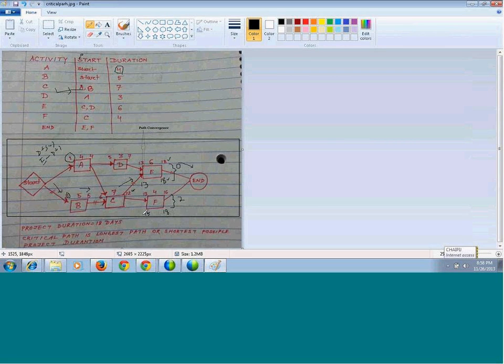Now if it can be started on day 15, then by which date must this be completed? It must be completed on day 12 because this is dependent on activity E. So if we delay this activity, we will delay E, and that will impact your project schedule. So you cannot delay this C. So it is 12 and so it will be 6 here as well. So as I said, this is also the critical path, so it must be 0. Similarly, B also will be 0 because all are dependent on the next activity and you cannot change it.